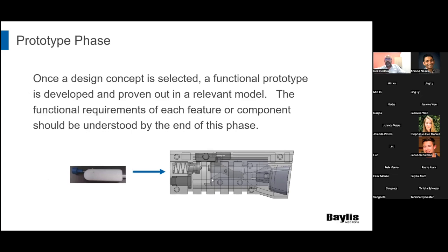Obviously, they're all part of the same design at the end. There are specific things in this particular design that have a high degree of dependency on alignment and tolerance, and those we would make 20 variations, each offset by 1,000th of an inch, and test them to see how sensitive the system was to inform the design. So I think you take an intelligent approach for where is the risk, and then you can break that out if you can to study it individually, so you really have good control of it. Then you can put it back in the design. For those which you know how to do already, you don't need to break that out. I think you can take an educated risk assessment on which ones need that deeper dive or further evaluation.